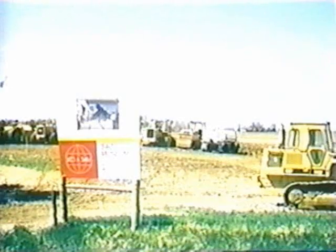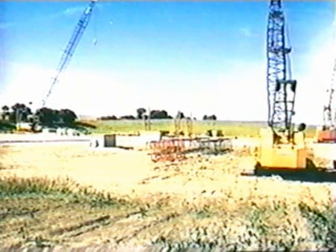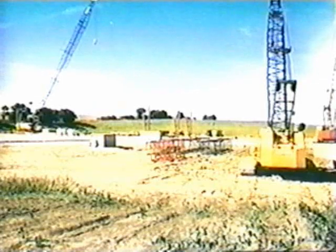Construction began immediately. Grading crews soon converted part of Nebraska's rolling farmland into a site that would be home to 3 major structures, 2 main exhibition hangars, one of which would also house a restoration facility, and an all-glass atrium that would connect the 2 hangars. The exhibition hangars would be large enough to contain 6 football fields.